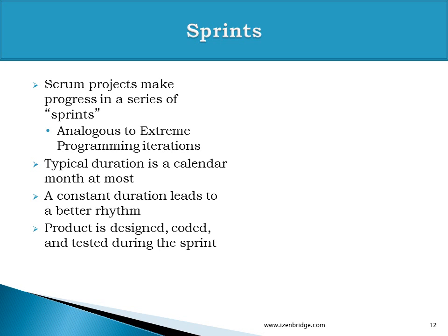And it is always recommended to have a constant duration for a sprint. We should not have, like, initially we run with a 2-week sprint and then gradually increase or decrease the duration of the sprints. The sprint should be of a constant duration because that gives a rhythm, that gives us adaptable benchmarks, which helps us in identifying how well we are moving forward.